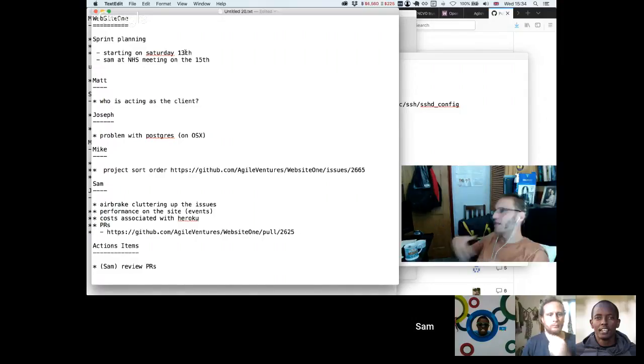In other contexts, if we imagine hypothetically that we were working in a large company on the same single project week in, week out, where the project itself may have different facets, what one would often do at the start of the sprint is choose a selection of items from the board. People would say, oh, I'm going to work on this one, I'm going to work on this one. You'd take on a reasonable amount and then do what you could to get the set allocated to you by the end of the week.